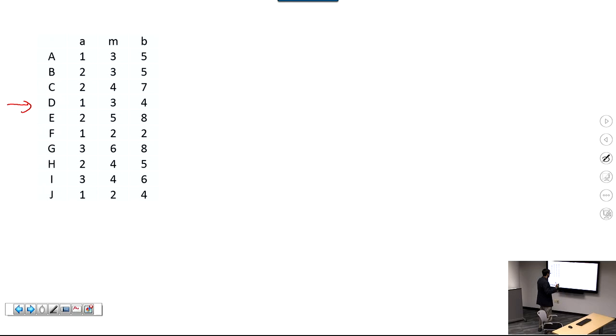Time estimate A is the optimistic time estimate: if everything goes well with activity D, it could be finished as soon as 1 day. On the other hand, if everything that could go wrong does go wrong, then activity D might take as long as 4 days. All the time estimates here are given in days.